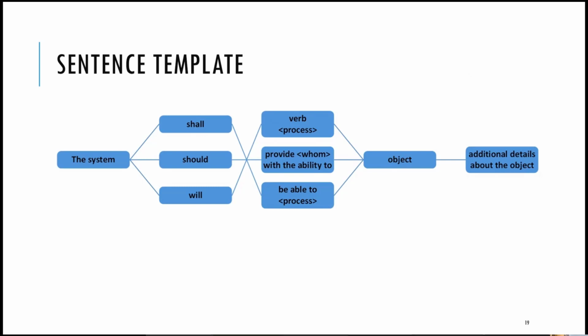You can use a sentence template to do this. Most of the requirements can be phrased the same way, so you don't have to think about how to phrase your requirements if you have a sentence template. Just put it into those templates. They ensure that the sentences are short and clear in natural language. Waterfall and Scrum need different types of sentence templates, but just look for one that suits the needs of the project most, or think about a template for yourself.